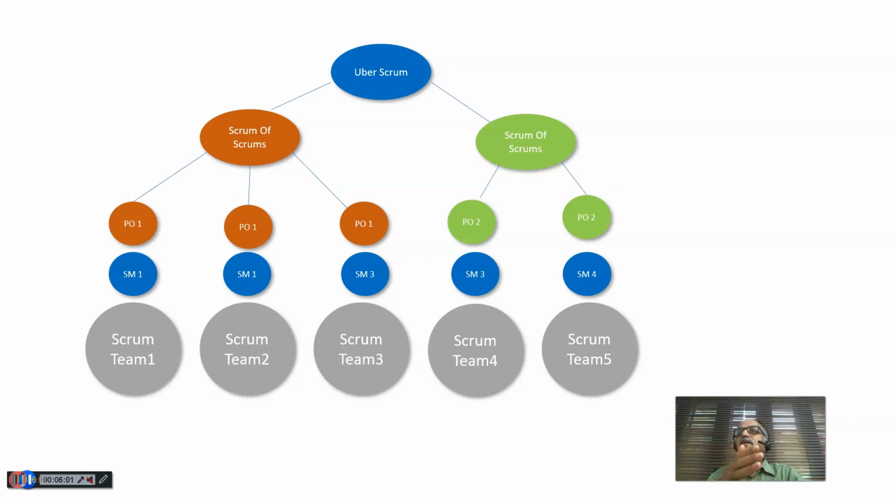All the engineering or pre-execution work can follow agile, and from the execution stage onwards it should be predictive. So a combination, we call it hybrid. All these things will influence the definition of the project's organization breakdown structure, because each project is unique, each project strategy is different, and we cannot have a cut and paste organization breakdown structure for the project.